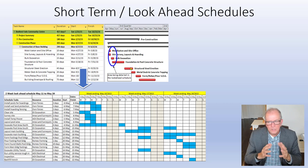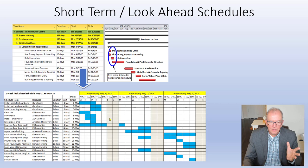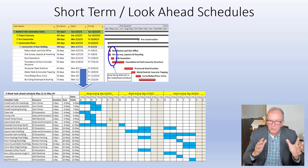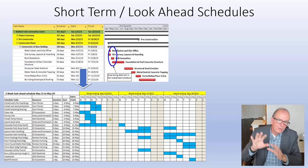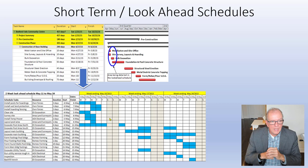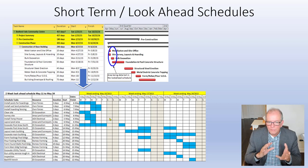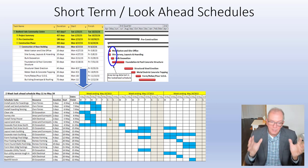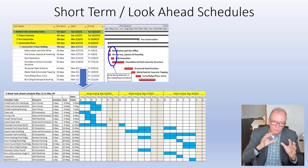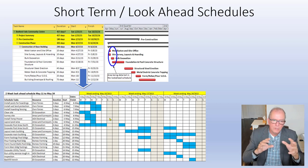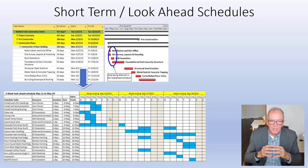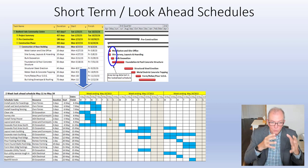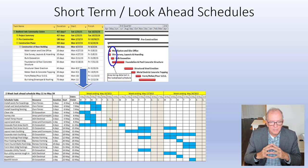From that, we should develop short-term schedules. This could be a three month look ahead schedule on longer projects. In lean they call it a phase schedule or milestone schedule. Then you're looking at anywhere from two week look aheads to six week look aheads. Whatever you're using, those should be flushed out really well. I personally like the four to six week look ahead because it gives you time to involve the parties very closely to try to expose possible roadblocks that can prevent you from doing the work. Once they're exposed, you can work at removing them so when you get to doing the work, you've got a high propensity to be successful.